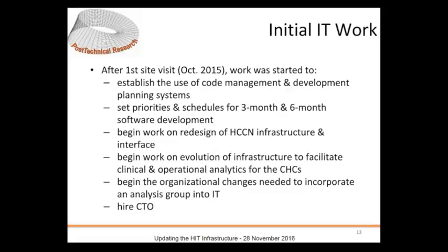So what then happened? After the first site visit in October, I had made some very detailed proposals about the establishment of code management and development planning systems, that priorities and schedules had to be set in 3 and 6 month software development intervals, that work had to begin on the redesign of the health center controlled network.